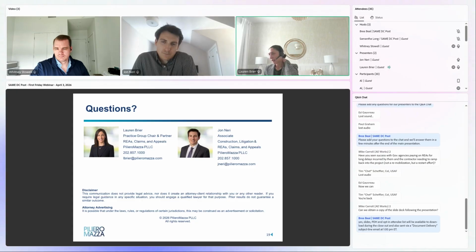We see a lot of clients that reach out to us later in the process and they send us their cure notice responses, and they've been making all these admissions like, yes, this is our fault, we're going to fix it, just allow us back on site. And the problem with that is when the government eventually defaults you and we're defending you in that case, and there's something on the record that says you admitted to doing the wrong thing, it's extremely hard for counsel to unwind that. So ever more reason to engage counsel early so that we can strategize an appropriate response to those cure notices, show cause notices, to either hopefully avoid a default, or if you do get a default, we're teed up with a solid record to challenge that decision by the contracting officer.